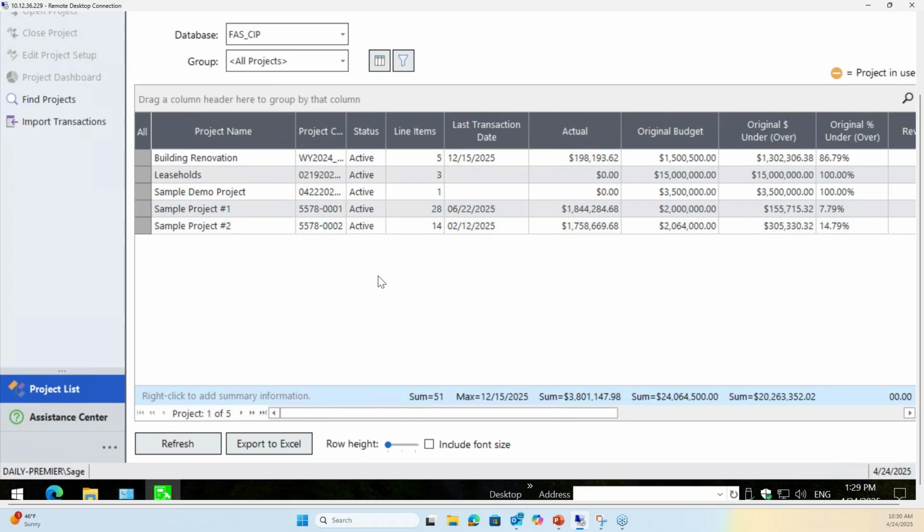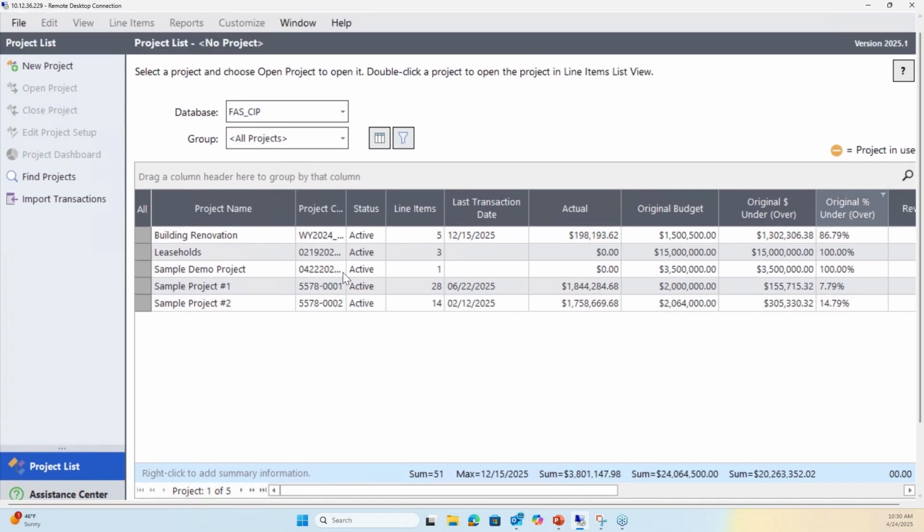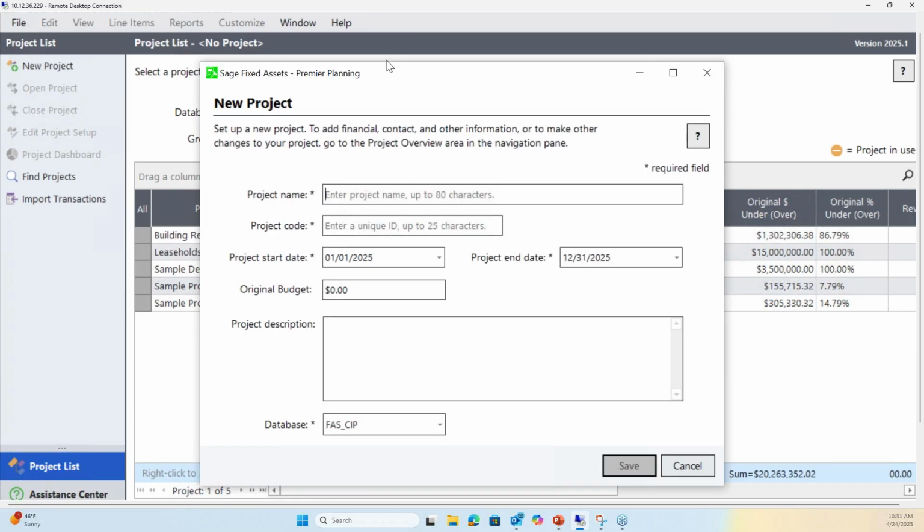Once you do that, then you can start moving line items. Why do I say that? Because again, going back to my recommendations and my tips, when you import your data, it's good to import them all into the pending line items, because then you can start to say, okay, this goes here, this goes there. Maybe I do need a new line item. Maybe I do need to break out building remodeling, as I put my quote fingers in the air, right? And I do need to break those out into line items, and so now I can start creating line items, which are assets or expensed items, to separate those out as well, right? So now I start creating these items, and then I can start moving the transactions out of pending and put them elsewhere.